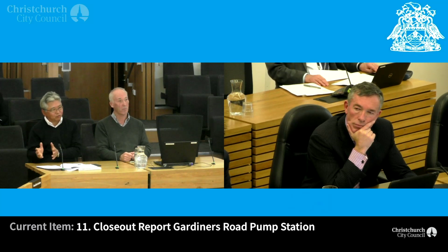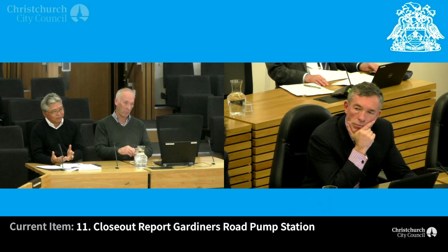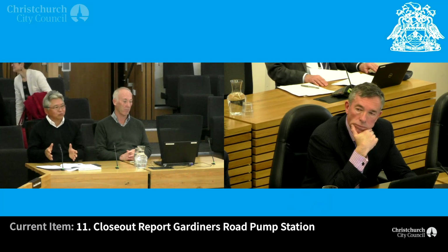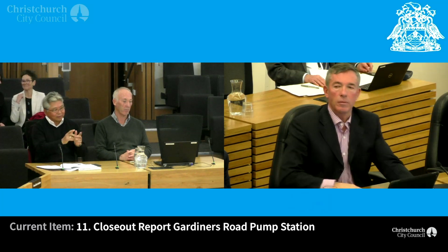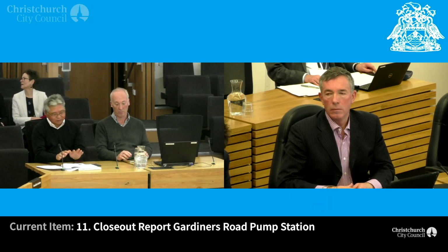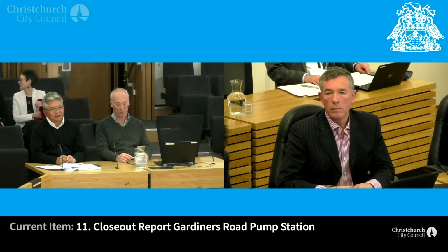So we said, okay, maybe we should put it into this contract because it suits better. So some of the variations were due to the change of scope moving from one contract to the other, because it fit better with this contract. So, yeah. The next question is, and the answer to the next question is, yes, we have a detailed lessons